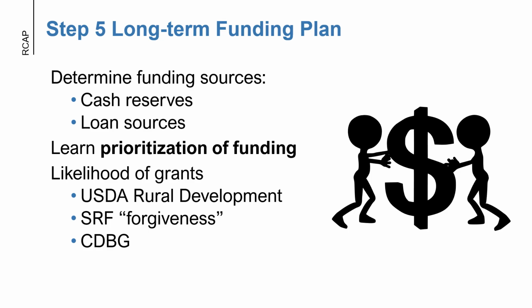After that, there's application. So even if the project scores well, timing matters. If a system doesn't have matching funds or hasn't submitted the right documentation, you might miss out and be bumped in favor of a lower scoring project that's already ready to go. And the next piece of this will be political or emergency influences. So sometimes urgent needs like natural disasters, emergency failures, or political pressures can lead to exceptions or expedited funding, even if a project wasn't at the top of the list.